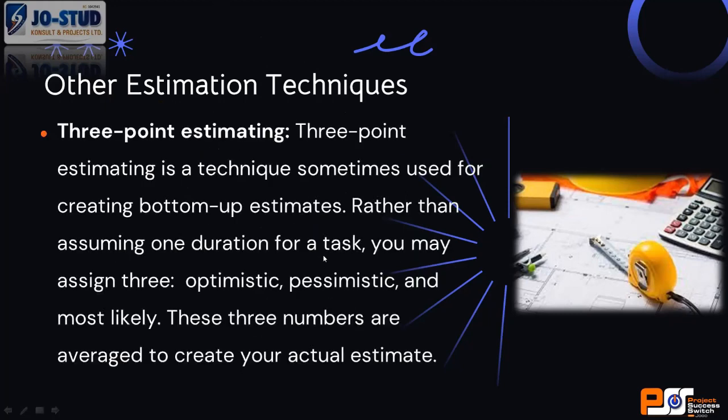Then there's what we call 3-point estimate. 3-point estimate is usually you use 3 parameters to judge. There's what we call the optimistic, pessimistic, and most likely estimate. For example, Mr. Johnson may use 2 days to lay 4 courses of block in foundation. Mr. Guadia may use 3 days. Then architect Oriako may be using maybe 5 days. Do you understand? Now, if I want to do a rough estimate, I will need to take the optimistic, pessimistic, then what I consider the most likely, and then I'll create that estimate.